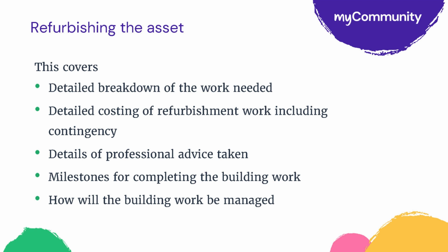We know that at the moment there are real problems about the cost of building materials and skilled trades going up quite steeply. So it is important to put in some contingency there to make sure that by the time the assessment has gone through, you are able to actually pay for the work, as it is likely to have increased.